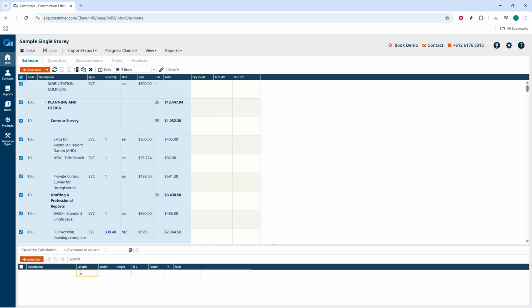Next, organize your costs so the forecast tells a clear story. Head to project structure, then phases. Group your BOQ items by project phase, such as foundation, structural, and finishing, or by your cost codes, depending on how your team reports. The goal is to mirror how the work will unfold in the real world. Consistent structure makes it easier to roll up values, compare like for like, and spot trends.